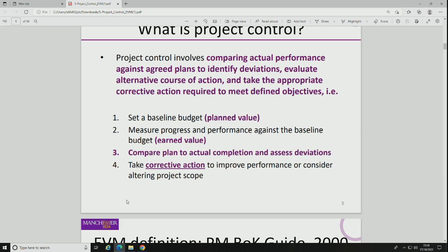In fact, I'm going to measure the amount of work performed by using the concept of budget. So the amount of work I've performed on this engine, I would only have budgeted... They should only have spent 10% of the budget. So that's the budgeted cost of work performed. So I'm able to see or make some sort of judgment about how much work has been done. And this is a contentious point in earned value because of uncertainty and the amount we can say about projects to any level of detail, because it costs money and effort to know as much as you can about a project in detail. You can never know the precise details of how a project is progressing, because it just costs so much money. There's the uncertainty.